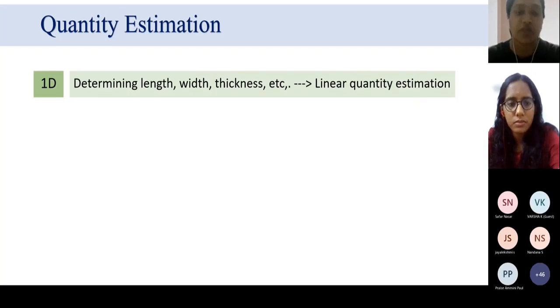But when we are trying to collect the estimate from a contractor who would be constructing the pile in site, they would go with the term running meters. That is the length or depth of the pile. That is the instance where you are using length over the volume.